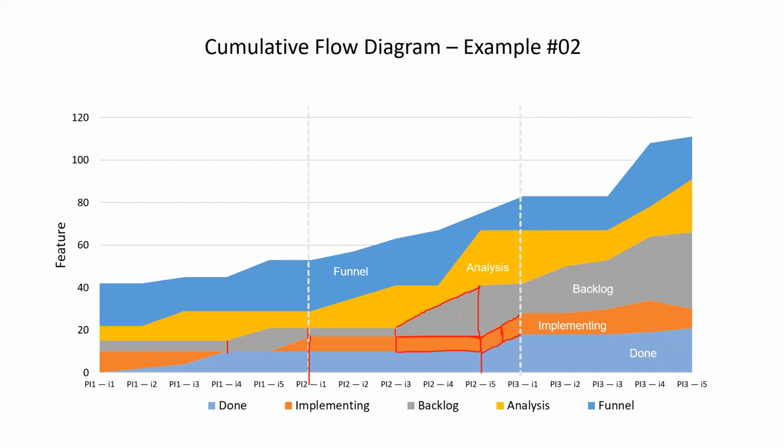So wherever we have a WIP limit, we are good. The team won't be overloaded at that point. But what about the previous stages where the WIP limit is not there? The team is refining the backlog and those stories are ready for implementation, but the team is not picking them up because they are still working on the implementation part.